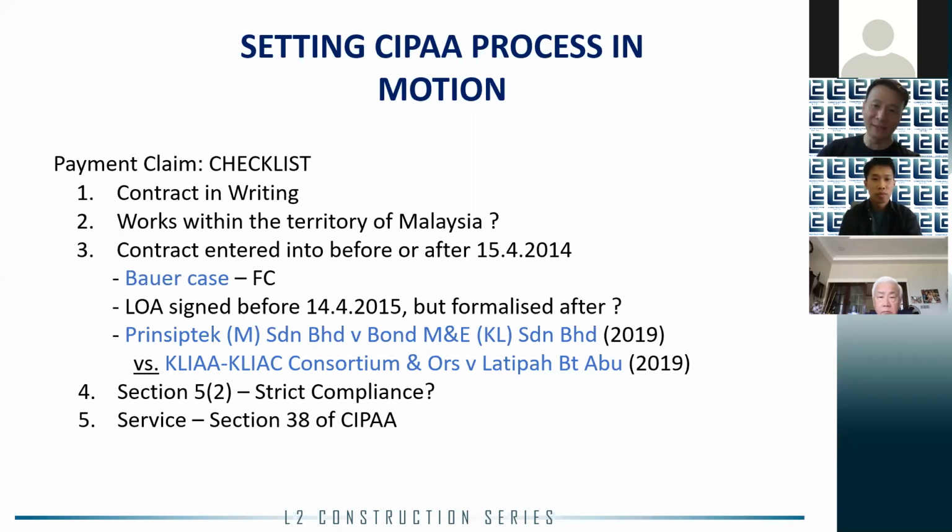retrospectively. But this position had been going on for about 3.5 years to 4 years until it was finally overruled by the federal court last year. Now, of course, I was also involved in the federal court decision. I was defending the High Court decision in Yuda Holdings, but I failed. And the federal court has overruled that decision and said that CIPAA only applies post its commencement, which is the 15th of April 2014.